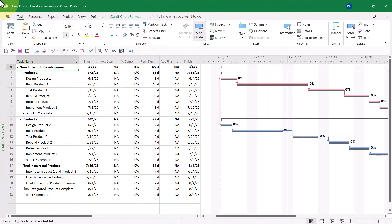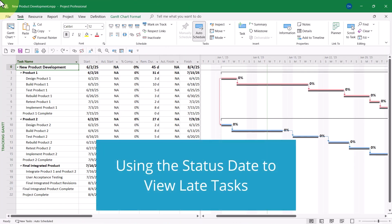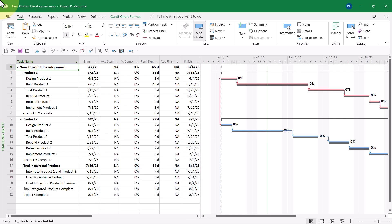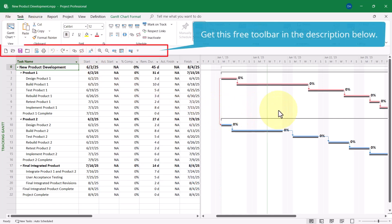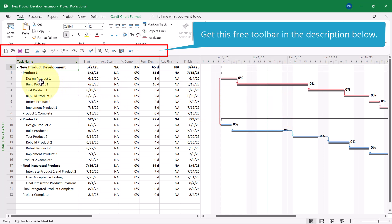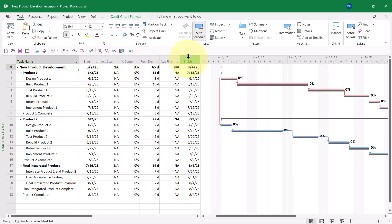If you watched my other YouTube video on how to manually enter task progress in a Microsoft Project schedule, then you'll notice that I have the tracking Gantt view displayed. I have the tracking table applied with the customized arrangement of columns in the tracking table, including Start, Actual Start, Percent Complete, Remaining Duration, Actual Finish, Finish.